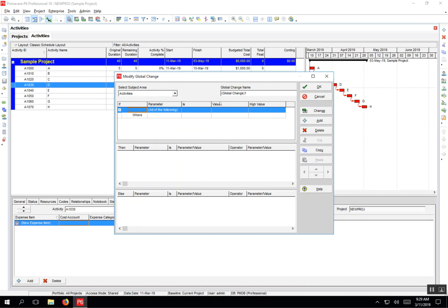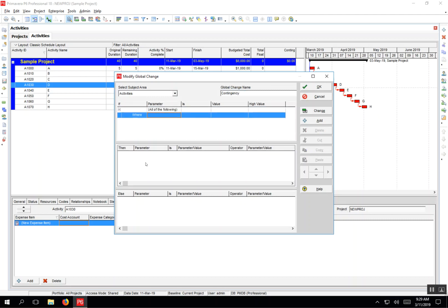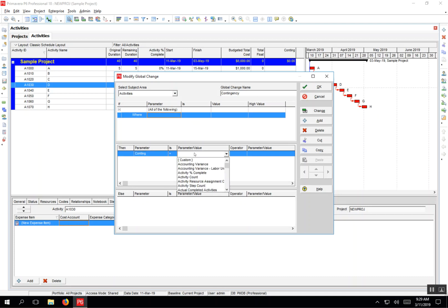I'm going to add one and call this one contingency. The if statement I'm going to leave blank because it applies to all activities. I'm going to go straight to Then, Add here, and say that contingency is going to be equal to—so leave that as equals—